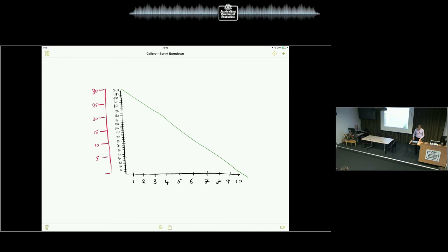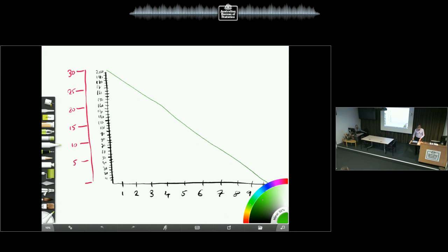And let's use a nice green color here. Now let's use red. So there's two axes on the left. Many people use story points. So each story will be attributed a relative sizing using the Fibonacci sequence of 1, 3, 5, 8, 13, 21. And they may use that for the burndown chart. And I know in Jira, that's how Jira uses it. The challenge I have in practice is most burndown charts start looking like this, which is no good at all, because on day six, well, how well are we doing? That's not transparent at all.